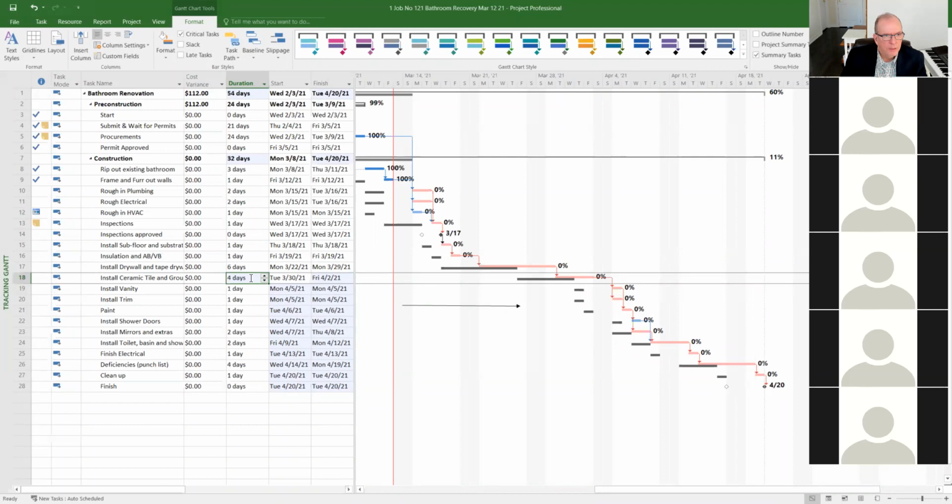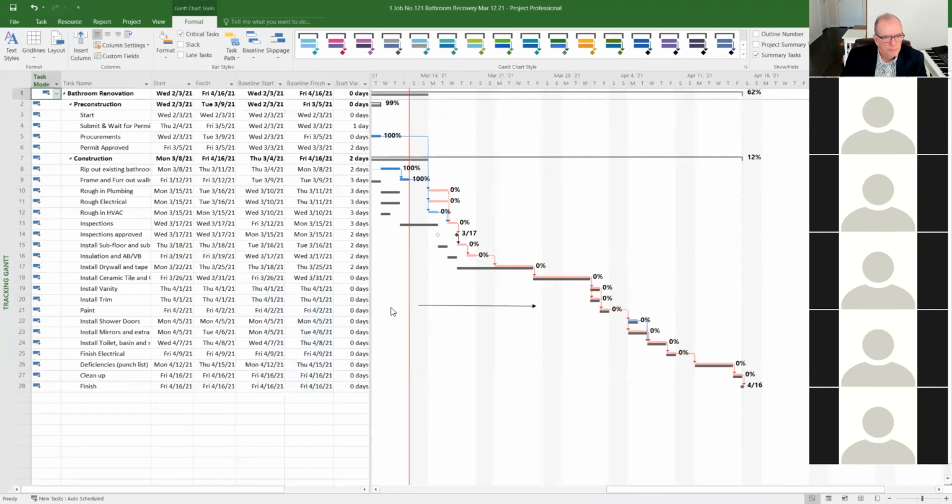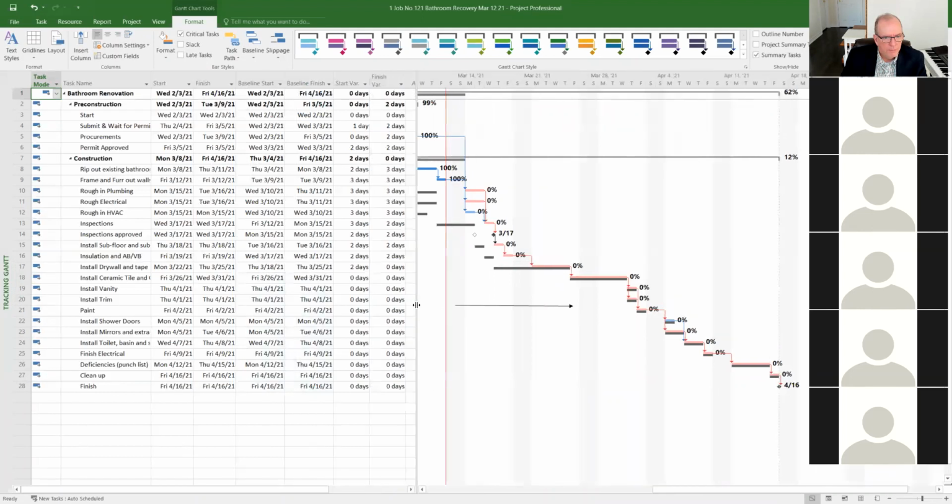So install ceramic tile. What did I end up with here? I thought we were, oh yeah, it was this one. I got it 6, right? So it was 4 days, this one, right? That's where we were. So that's at 4 days. So we dropped that 2 days. So now if I go and check my variance, I'm back to 0 days, right? My project is back on track. So I'm going to finish at the same time.